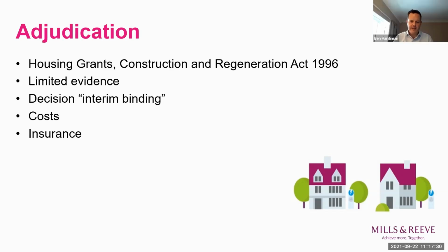Yeah, it goes back to time being of the essence. Read your policy. The policy of insurance, your PI policy, most normally include a specific notification provision for adjudication. So that's separate to the normal notification provisions. The majority require notification within 2 or 3 working days. Now that is obviously very tight, but if you don't get things moving quickly, you're not going to be able to respond in time.